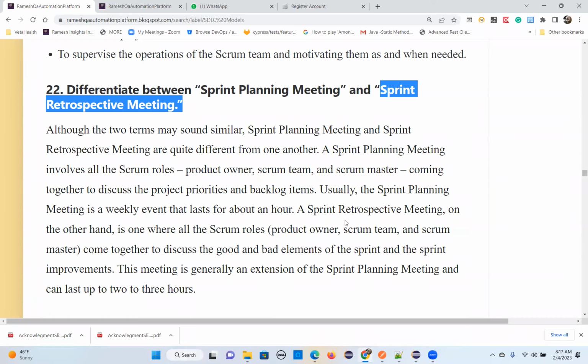What went well, what went wrong, any improvements needed to make the Scrum process smooth. And then action items, maybe action items on different people, maybe team members or the Scrum Master and the product owner. There will be action items for the next sprint. Okay. And then, any shout outs you want to give, those are all good and bad things you will mention in the retrospection meeting board. So this will be recorded. That's the retrospection board. Retro board, we call that.